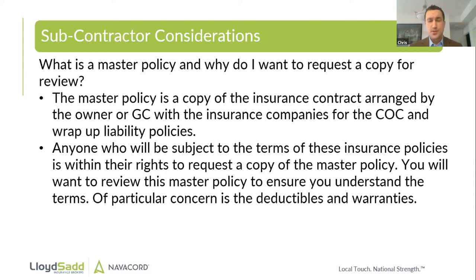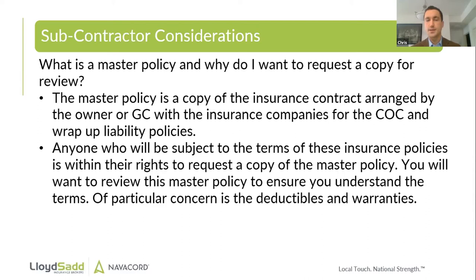I'll jump into the subcontractor considerations. Generally, when there is a COC and a wrap-up liability policy on a project, we refer to it sometimes as the master policy. As a subcontractor, I would strongly advise that you always get a copy of this master policy for any projects that you're on. If you are working on that project, it is definitely within your rights to request that from a general contractor or owner. The main information you're going to want to be looking at is the deductibles and the warranties.